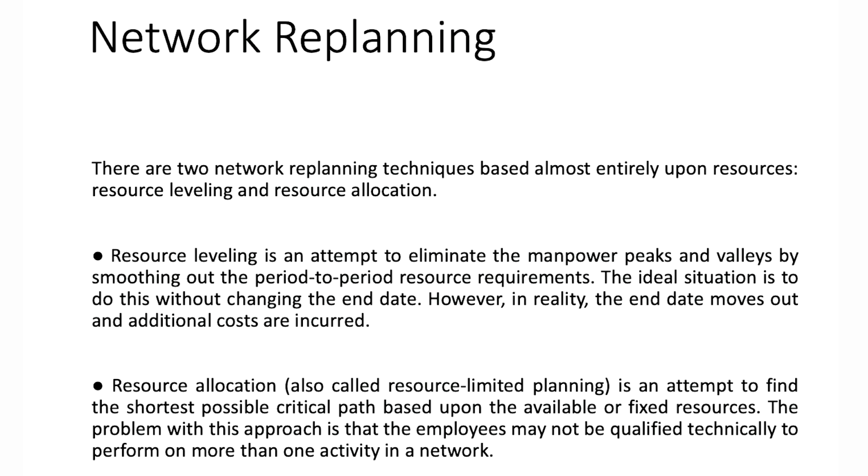Then resource allocation, also called resource limited planning, is an attempt to find the shortest possible critical path based upon the available or fixed resources. And the problem with this approach is that the employees may not be qualified technically to perform on more than one activity in a network. And also they might not have time or can be overutilized.